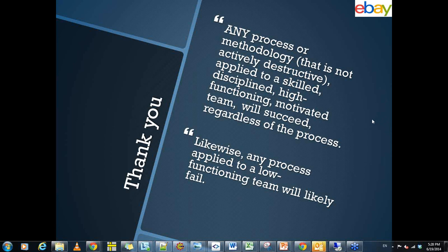Why do we have 1 as the minimum limit of the to-do list? We have it as 1 in our sample Kanban board because we want to make sure that at least we know what is happening next. We have the smallest insight, the minimum insight into what is coming up next. But you can also choose to have it as 0 if you know that after this last feature there will be nothing left to do.